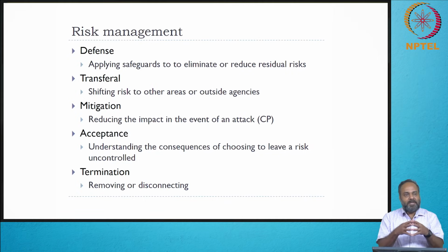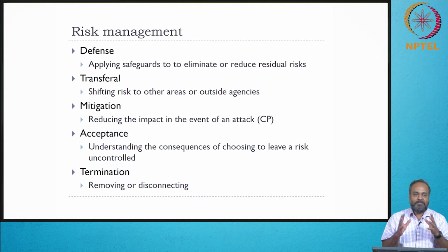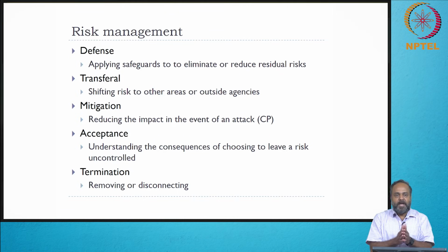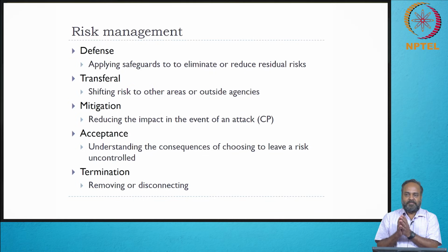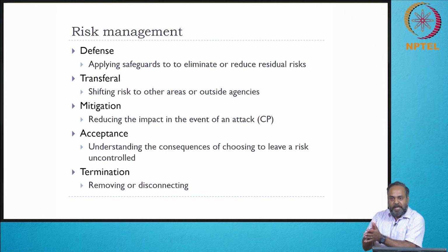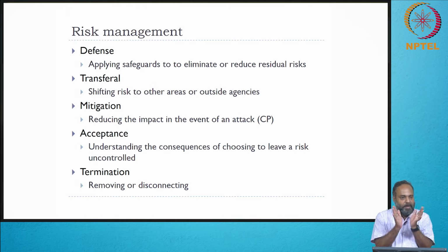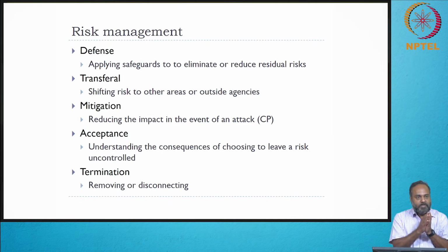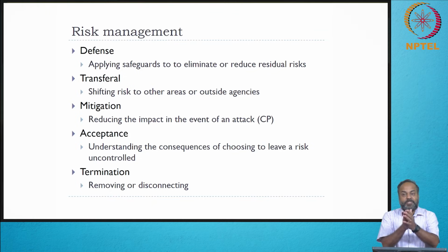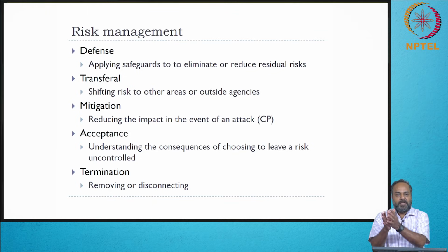So, for example, if you invest in contingency planning, you actually create a team for contingency planning, you invest in a hot site, are you defending? It is not an investment in defense. It is an investment in reducing the impact, and therefore, it is a mitigation strategy. So, you have to look at it from two aspects, in terms of managing risk by the client. Of course, one is to invest in defense technologies, other is to invest in mitigation. Mitigation means how do you reduce the impact.